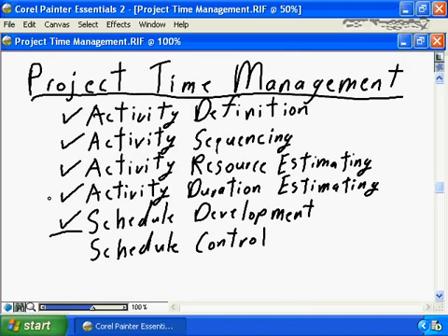Although it may appear overwhelming to have 5 separate components related to project schedule development, it actually isn't that bad. The PMP defines, and in reality you will find, that many times on smaller, simpler projects, activity definition, sequencing, resource estimating, duration estimating, and schedule development will happen concurrently. You will not be conscious of doing a separate activity for definition versus sequencing versus estimating versus development. And in fact, on many small projects, these 5 components will be done concurrently with developing the work breakdown structure as part of scope definition.